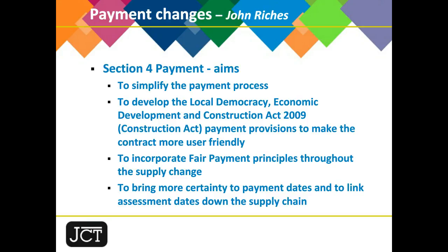In addition, we decided to incorporate the fair payment principles throughout the supply chain, which means we were conducting a balancing act between the Construction Act and fair payment to try and get the whole thing to work. Quite a difficult exercise when it comes to timings, linked timings, and provisions on notices and the like. And finally, we decided to bring more certainty to payment dates and to link assessment dates down the supply chain, which follows fair payment.